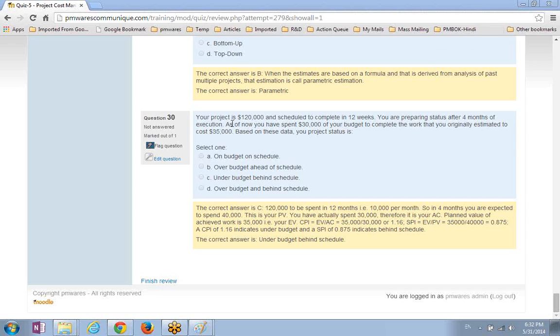Look at this. Your project is $120,000 and scheduled to complete in 12 weeks. You are preparing status after 4 months of the execution. As of now, you have spent $30,000 of your budget to complete the work that you originally estimated to cost $35,000. Based on this data, your project status is...